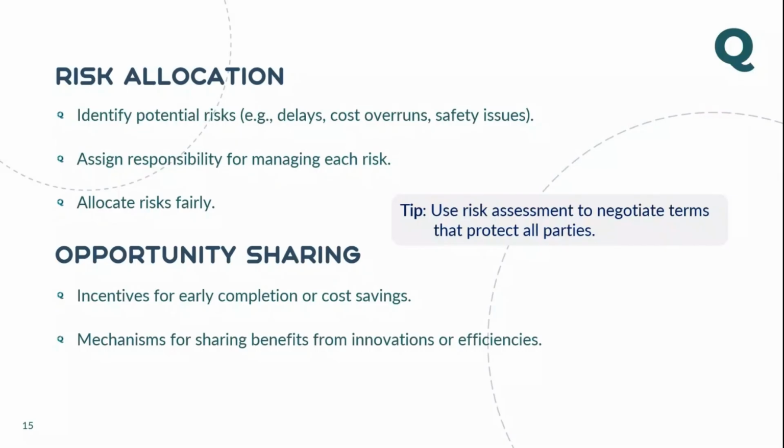So I was telling you, first look into the obligations of the parties. Once you are clear with the obligations, then you go to risk and opportunity. Why am I saying you first have to review obligations? If there is a mismatch or a discrepancy in obligations, there is no point going to risk. You have to clarify scope, obligation, and responsibility first. Then you can go to risk allocation, because if you do not clarify those things, you will treat them as a risk in the register, but eventually that is not part of your scope or is not being addressed. So first you address those parts in the obligations.